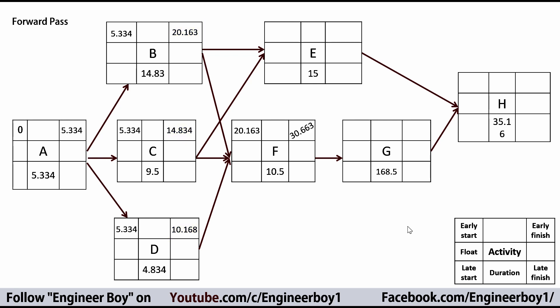Adding the duration of F, which is 10.5, gives 30.663. This is then forwarded to G as the early start of activity G; add the duration to get the early finish of G. For activity E, it has two predecessors B and C, so we take the maximum early finish — that's activity B — forward it to E, add the duration of E which is 15, giving 35.163.